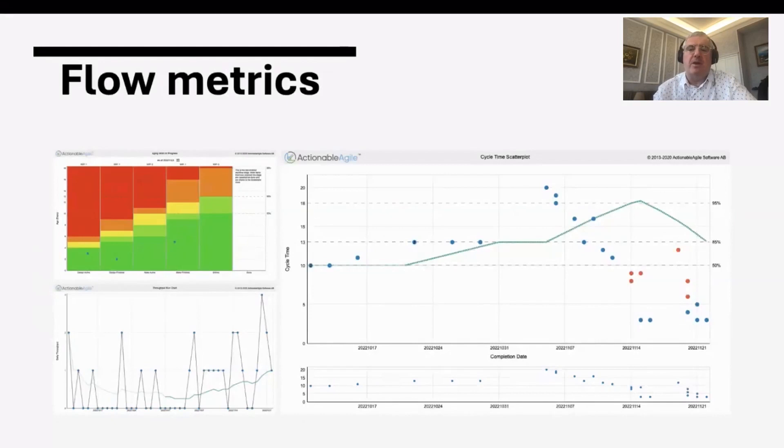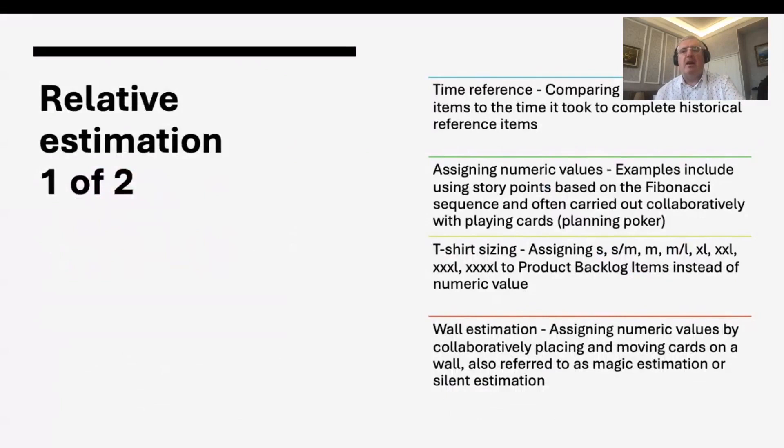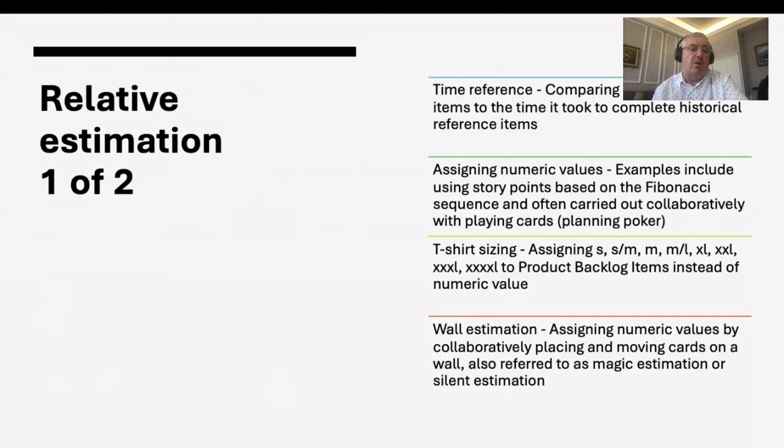On relative estimation: time reference means comparing current work items to items you've done before. Interestingly, when you recall a past item, you remember how long it took — including waiting time — not the story points or ideal hours you estimated. So the waiting time is included, which is really interesting. You can also use numeric values, the most common being story points on the Fibonacci scale.